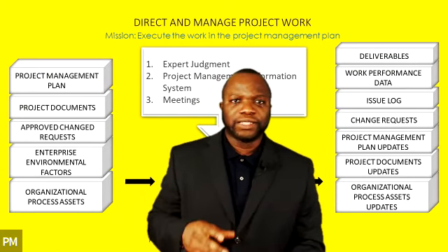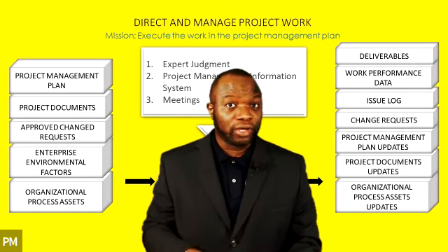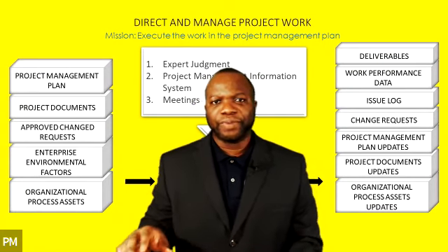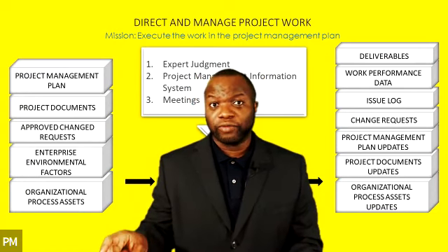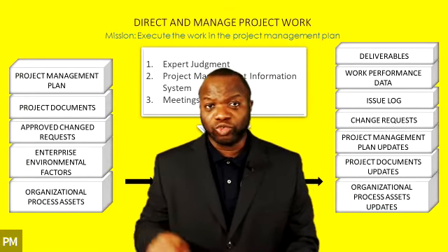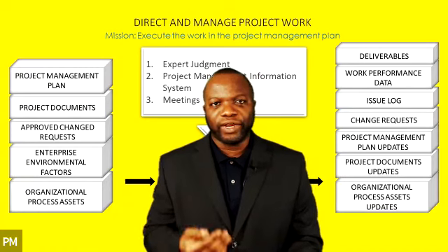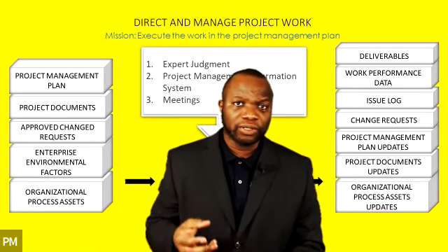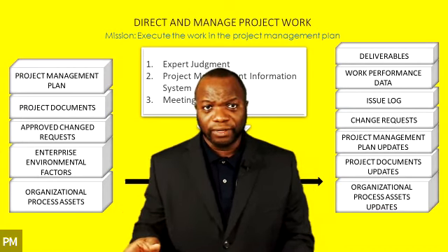However, there is a schedule baseline that does not change. The schedule baseline is the original schedule etched in stone and frozen that management is going to look at to hold you accountable. But the project schedule is for everyday management of the project. And you can change that.